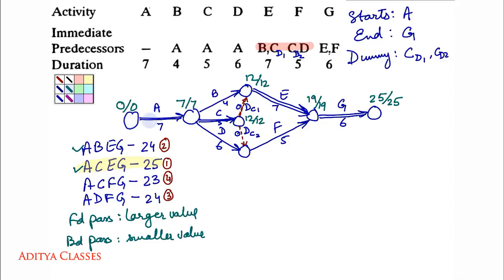Now path A, D, F, G. Forward pass: 0 plus 7 is 7; 7 plus 6 is 13; 13 plus 5 is 18 — but we continue with the existing 19 since it is larger; 19 plus 6 is 25. Backward pass: 25 minus 6 is 19; 19 minus 5 is 14; 14 minus 6 is 8, but we continue with the existing 7. 7 minus 7 gives 0.